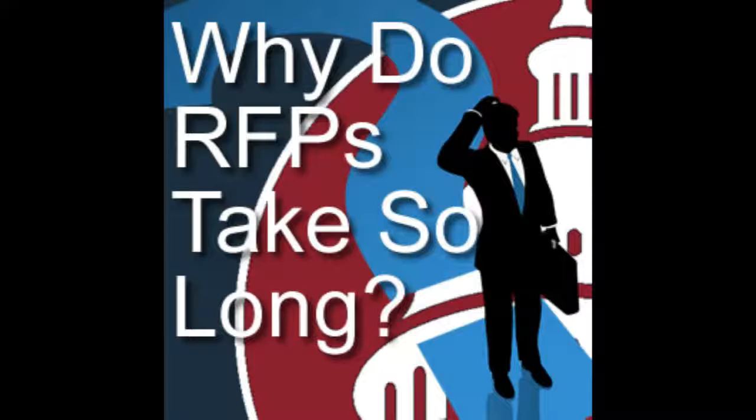Kevin, tell me a little bit about how the complexity of the requirement drives schedule. Well, the biggest thing is how fast you go through the time zones. If it's a complex requirement, meaning it's going to have subcontractors, it's going to have a manufacturing cycle, you're going to have to decide whether this is a 1-year contract or a 5-year contract. And if it's more than a 5-year contract, speaking of getting approvals, that requires a specific approval, as does whether or not it's a small business set aside, because that requires approval from certain individuals in the process. There's also laws you have to stick with: certain things have to be competed, certain things you don't have to compete, but you have to get approval. So there's all these pieces that go into it.